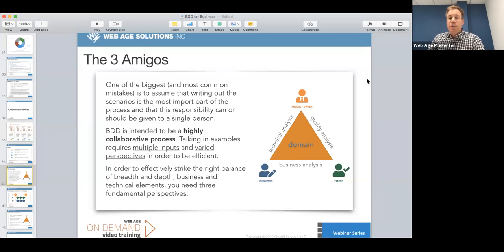Right, so if you are at the beginning of a project, then you'd probably create your product backlog at the beginning of the project, right? Or it might already be created for you if you went through some sort of process to define what the project is. Lots of organizations go through a discovery phase where they write some things to get funding for a project, and they write high-level pieces of functionality that they'd like to see, high-level behaviors, that kind of thing. And if they've done that, then that is actually your initial product backlog.